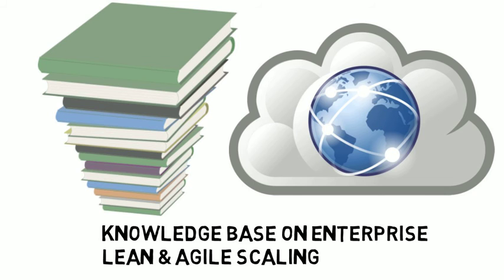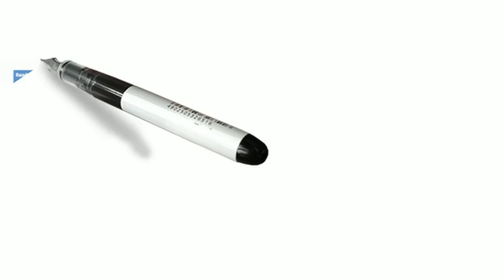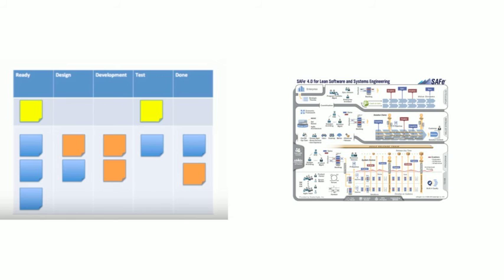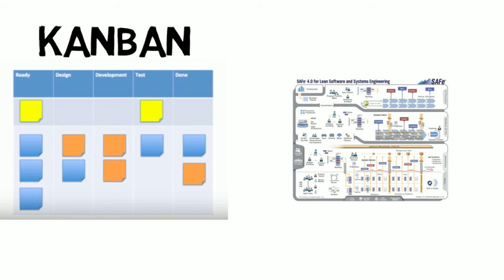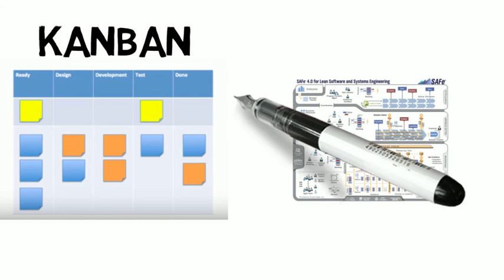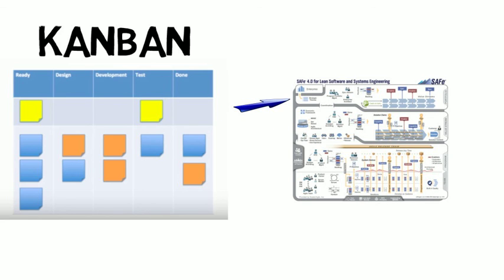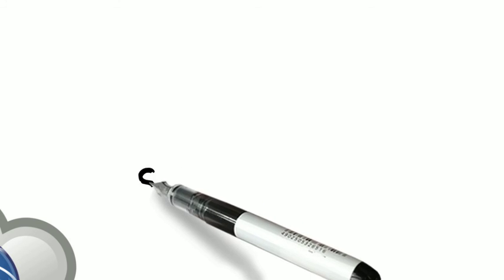Now, another concept that's added here in a lot more frequency than it has been in the past, we see, is Kanban. I'm a big fan of Kanban, and I think it's a very useful method to use. So what happens now is that not only do we have Kanban where we had the portfolio level before, but Kanban also gets included at the value stream level, which is new, of course, to SAFe 4.0. It's also included in the program level, so you have program Kanban as well, and at the team level. So you can have Kanban and Scrum teams working side by side as a part of the release train, as it's called, in SAFe. So Kanban really becomes a first-class citizen in the 4.0 version of the SAFe framework.